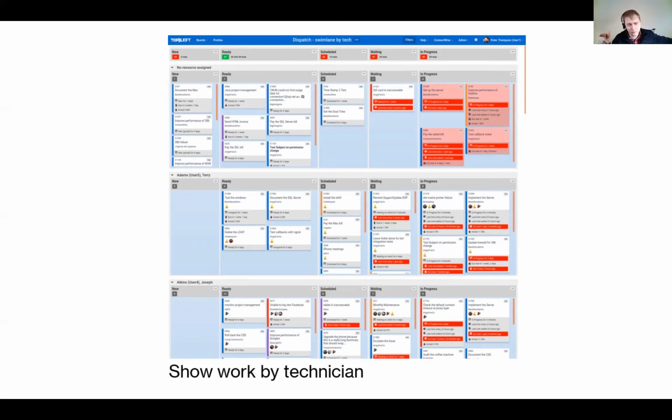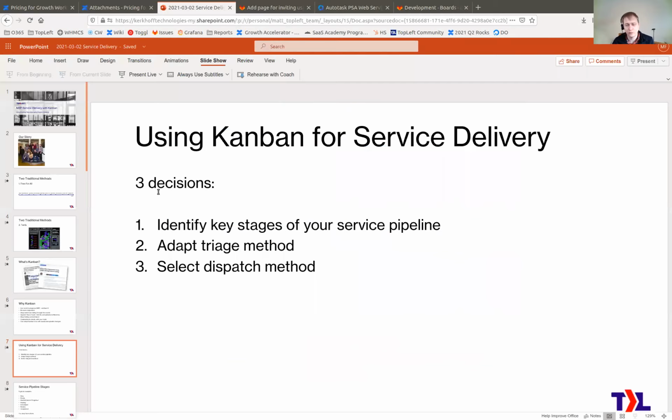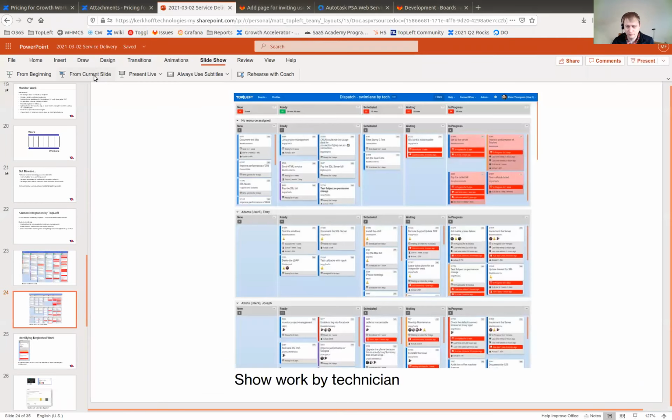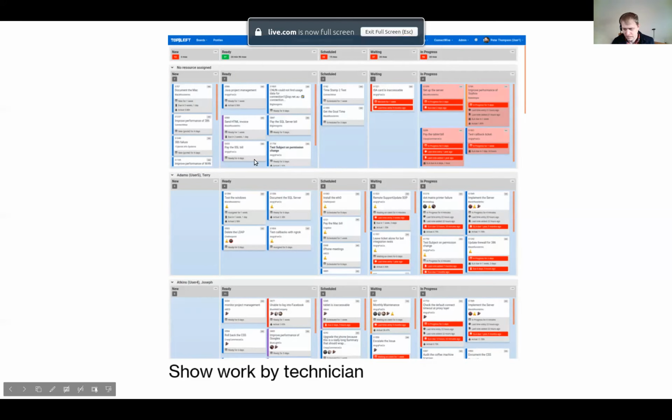And you can use this exact view to make that really, really fast, because everybody just goes through and reports on any of their tickets that have red on them. If they don't have any tickets that have red on them, then they don't have anything to report on. Okay, easy. That actually encourages the behavior that you want, to keep the tickets up to date.